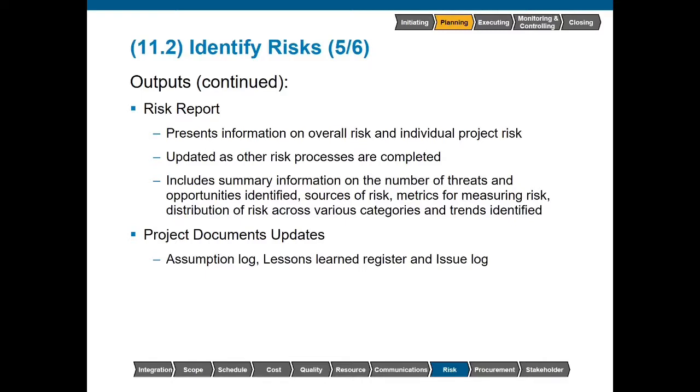Our project documents updates include the assumptions log. Now that we have really tested the veracity of the assumptions that we'd made earlier during planning, we can update the assumptions log accordingly. We can also record lessons learned. What went well during the identification of risks and what can we do better next time? And also the issue log.